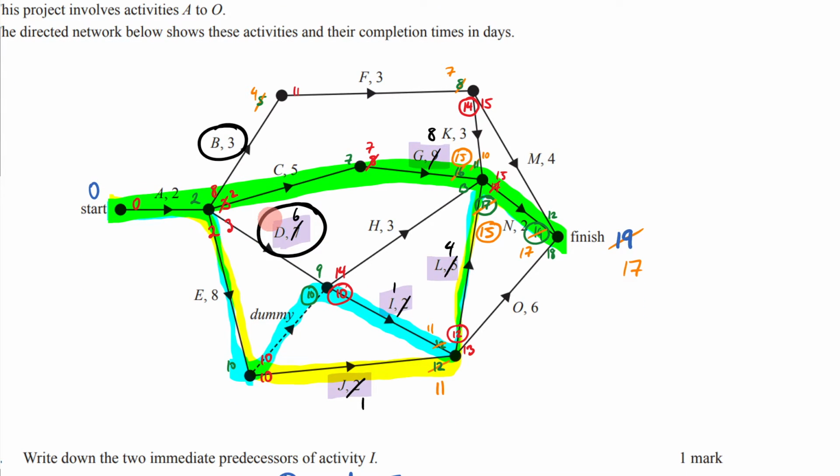Don't reduce it. Was there any point reducing this one? No, there was no point in reducing that one either, because if we did reduce it, if this now becomes 6, then what I'm going to end up with is 2 plus 6 is 8. Well, it's still not going to get close to 10, so that was pointless to reduce. Keep that one. We need to reduce this, this, this, and this.